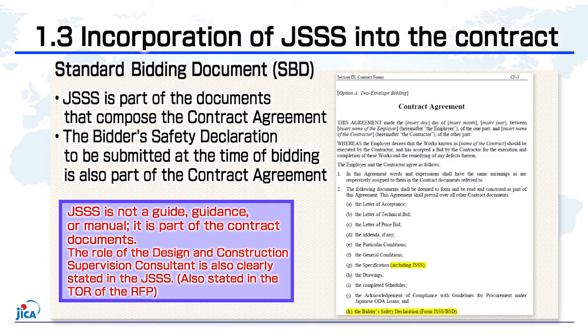Section 1.3 establishes the contractual priorities of health and safety specifications. The order of priority of health and safety requirements is Particular Safety Specifications, JSSS, and other general and technical specifications.